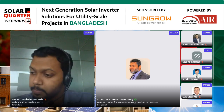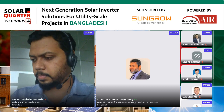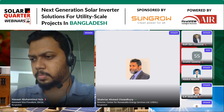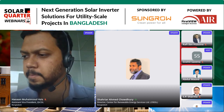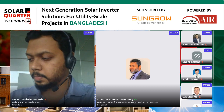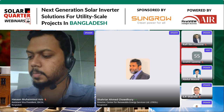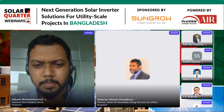And as Mr. Sudhir has said, we definitely need to have a string level monitoring system. That is number one, and number two, the availability of spares. The developer and the inverter manufacturer should provide a list of equipment which, from their experience, frequently gets damaged. So there should be some inventory in the plan. From my experience in some projects, if I use a 2 megawatt inverter in a 20 megawatt project and something happens in that inverter, you are losing almost 10% of the total energy of that plant, and that is a huge loss for the developer.